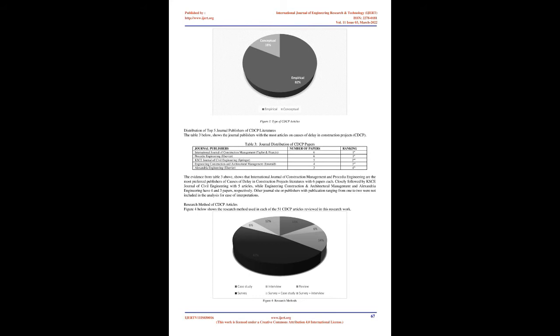Zayyanu and Anderson, 2018. Analysis of the top 10 universal delay factors in construction projects and review of delay factors in major Norwegian construction projects. The Norwegian construction industry experienced delays due to poor planning, scheduling problem, slow decision process, administrative challenges and bureaucratic inadequacies with the project organizations, resources inadequacies, lack of good communication and coordination between parties in the project.